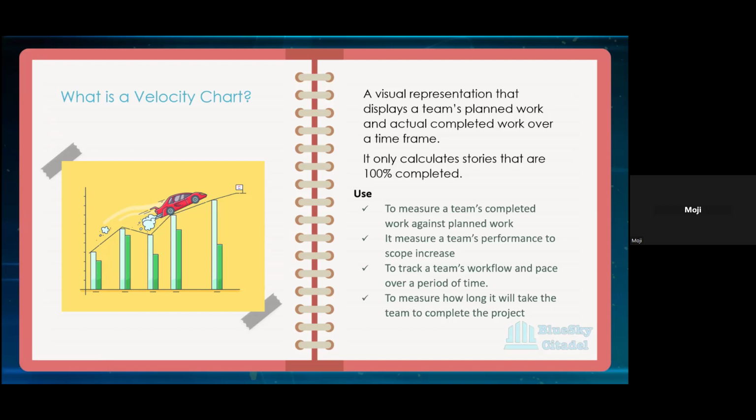You would expect that going into the next sprint, they will use this first sprint to guide themselves, to say, if we committed to this and we didn't even complete up to that, then in the next sprint they should reduce what they need to do. Now there are a lot of factors that come into your velocity chart. So for you to use your velocity chart, it is good to let it guide you, but you also need to know the capacity of your team when you're using it.